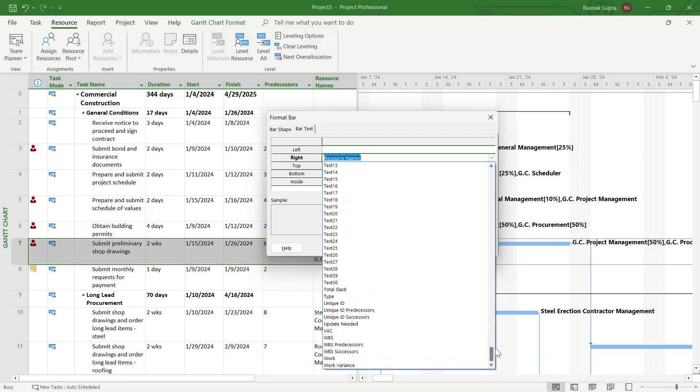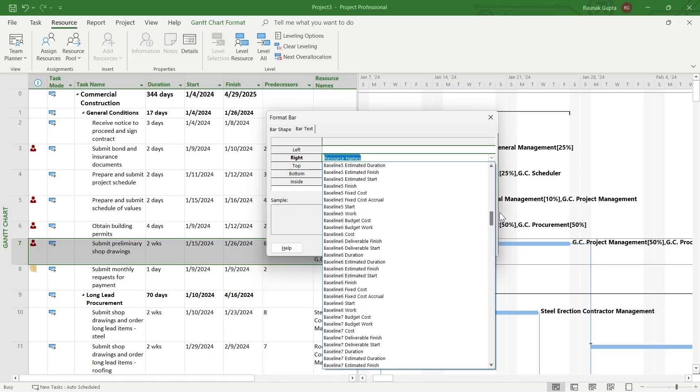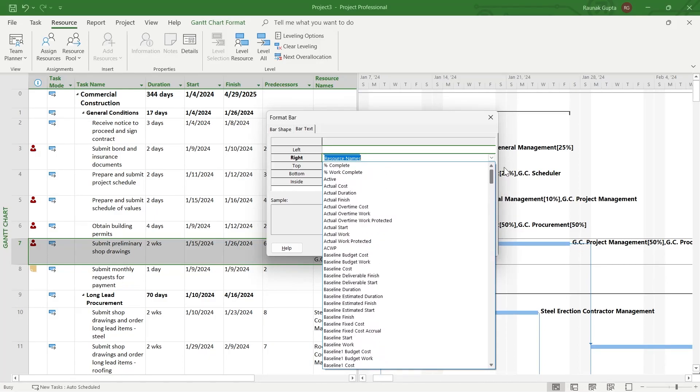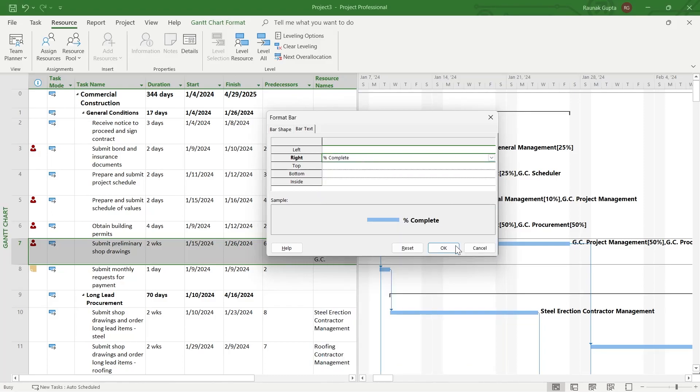In this list of options, choose or write anything that you want to label your bar. For example, I want to label my bar according to the percentage complete. So I will click on percentage complete and click on OK.